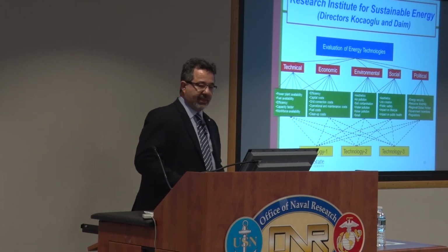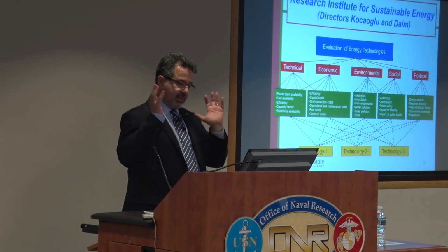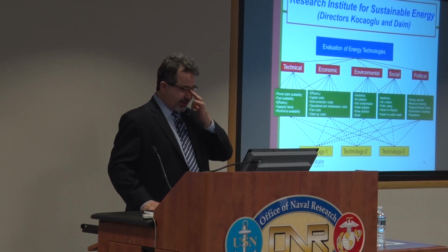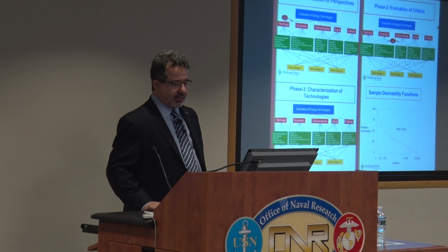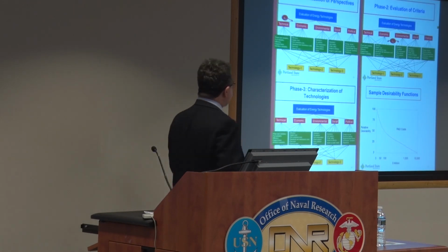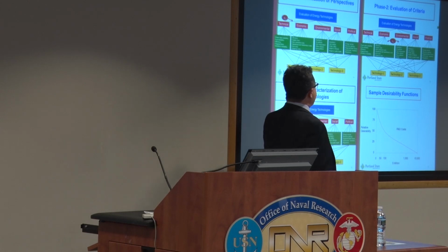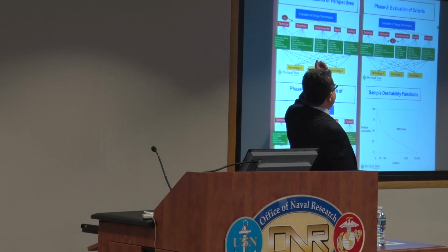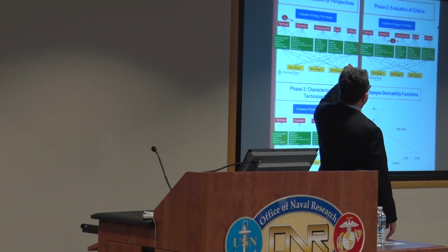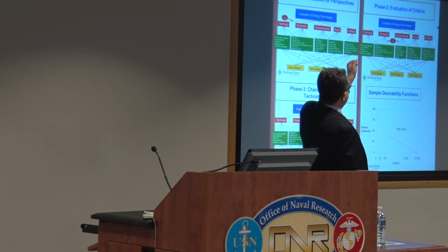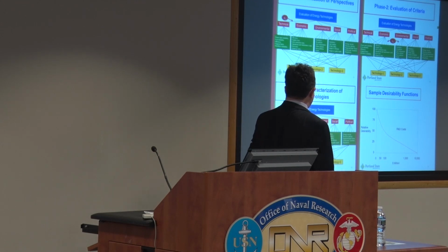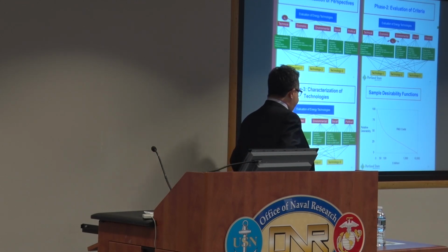had a general set of criteria which was specifically applied in different areas. We had more than 10 PhDs coming out of this program, but what it did was it used what we call hierarchical decision modeling, which again, it's very much like any other multi-criteria decision model. We calculate the perspective weights, the criteria weights, and then what we calculate is desirability curves.